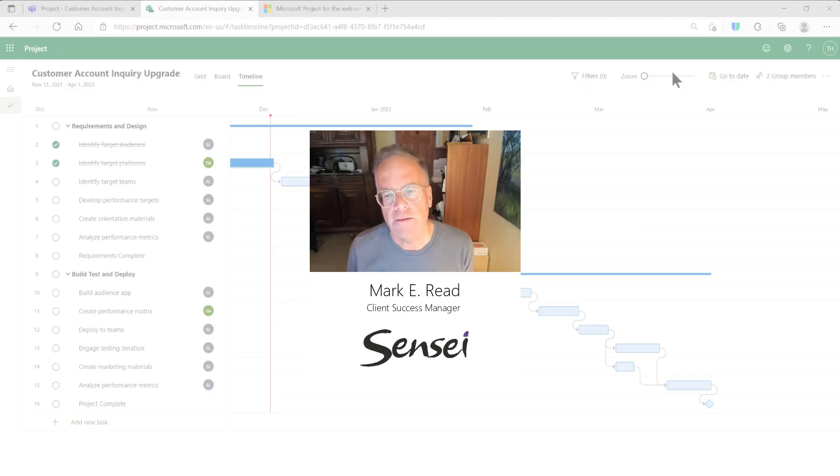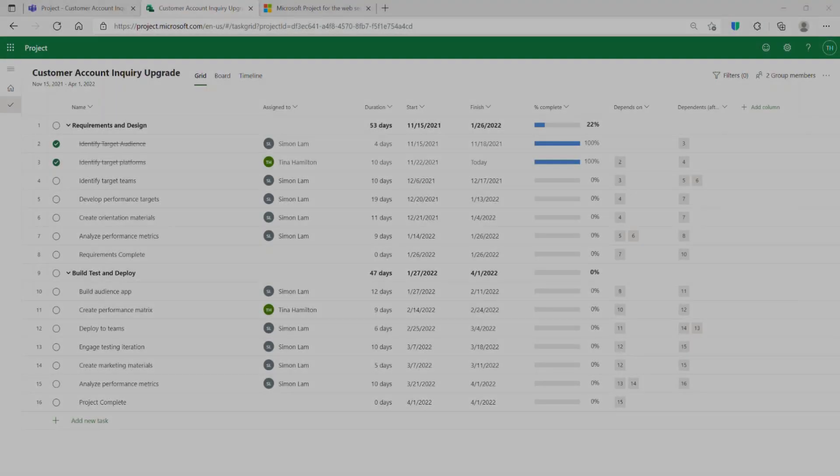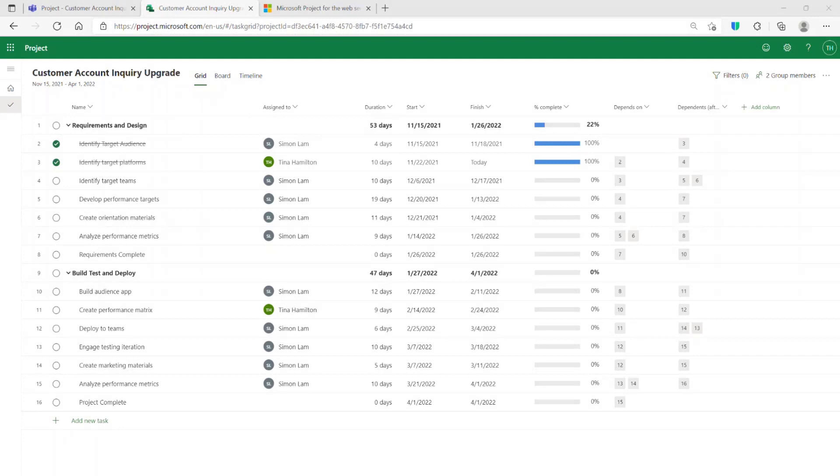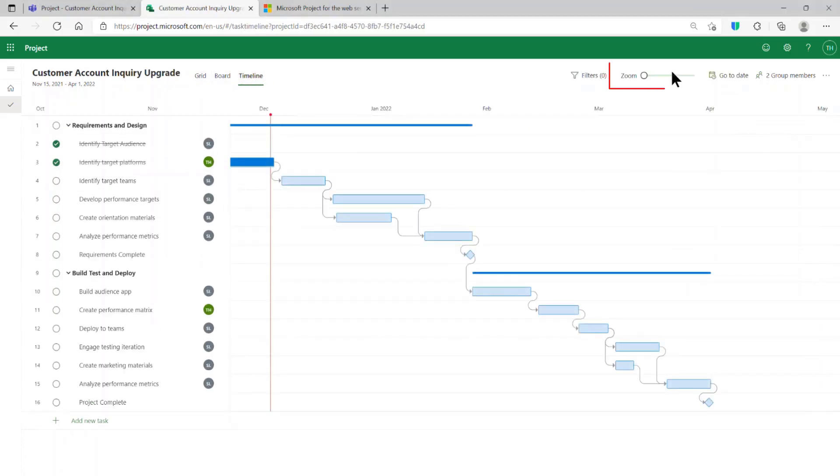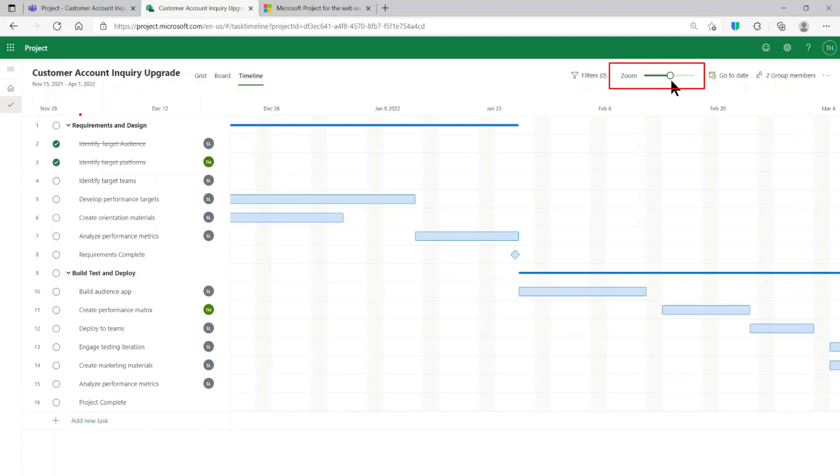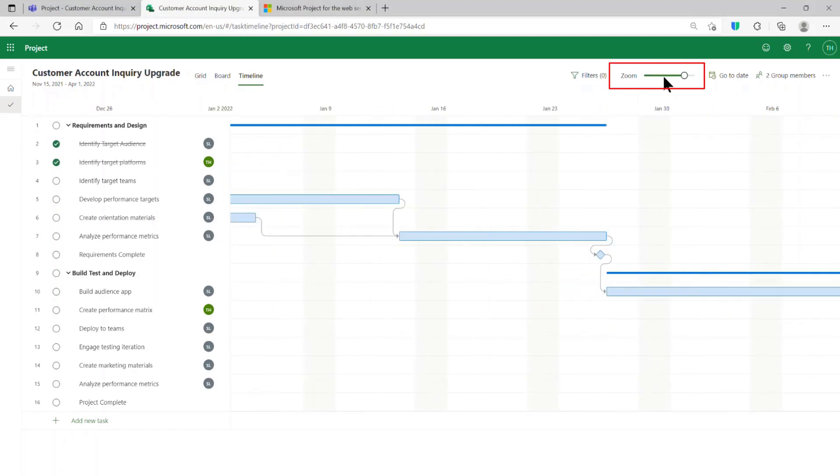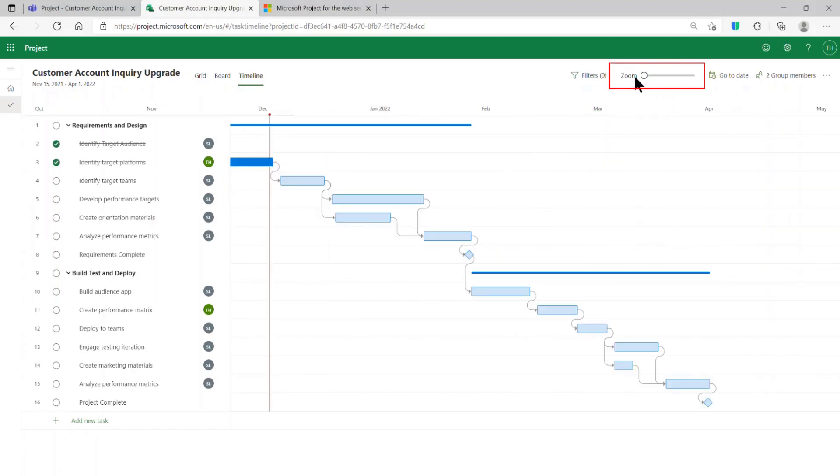Come take a look. To show critical tasks in your Project for the Web project, you will want to open your project and go to the timeline view. You may want to adjust the zoom level to make sure that you're focusing in on the tasks that you want to focus on.